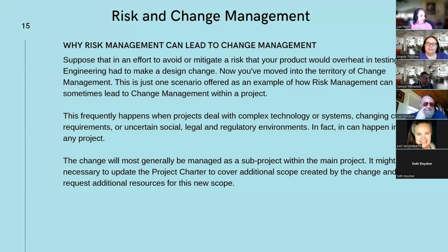But when a change does come up, it's frequently managed as a sub-project within the main overall project, if it's in scope. If it's something that comes up that's out of scope, that may launch an entirely new project. And you'll probably get that too. So be ready for that.